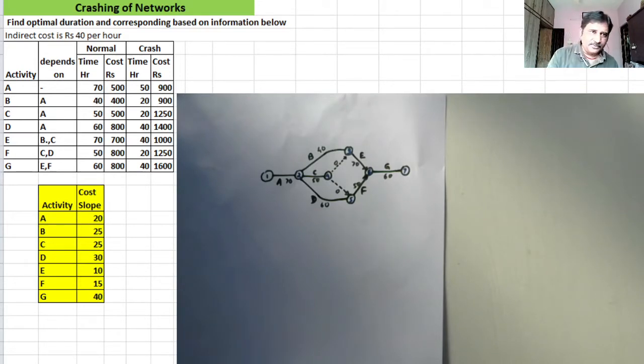Here, one thing is important. Activities E and F commonly depend on completion of activity C. Other activities, however, are different. But there is one common activity in the depends-on column, that is activity C. This is indicative of the fact that you will have to make use of a dummy activity for representing this dependency.